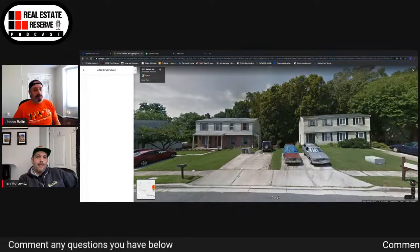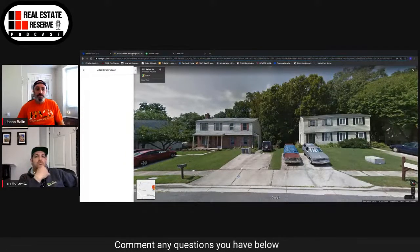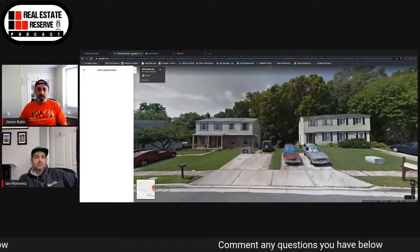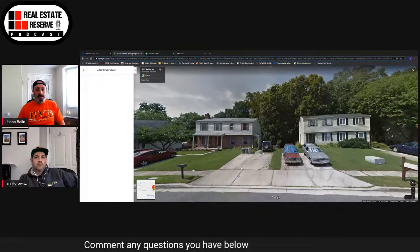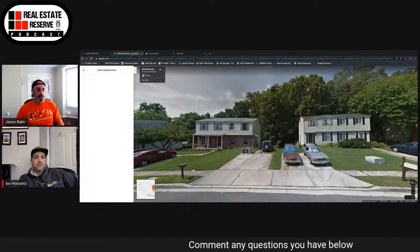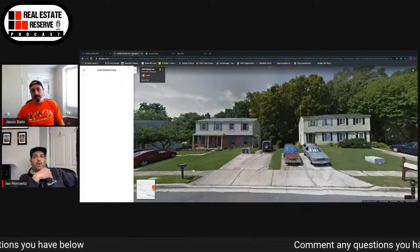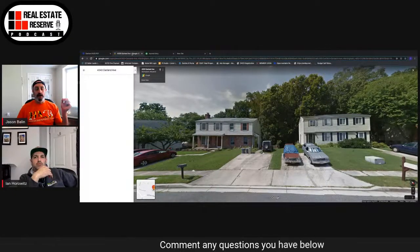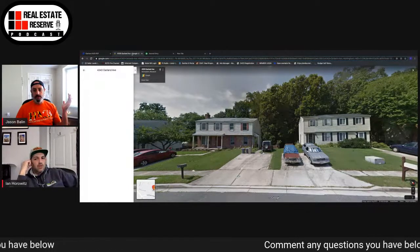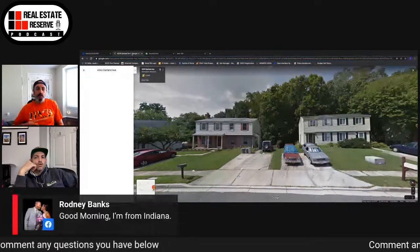Yeah, it's also because you're doing a lot of heavy lifting on the front end. A lot of investors, the ones that want to do lipstick on a pig projects, especially if they're holding them as rentals, it just comes to bite them down the road. They put less money in now, but then instead of having a 10 or 15 year life expectancy on a roof or something else major, those capital improvements pop up one by one. This year I got this, this year I got this. Either you put it in on the front end, or your maintenance costs on a monthly and yearly level are just astronomical, because you're just redoing stuff. We ran into that with a whole bunch of rental properties that we own, and it's happened to us.